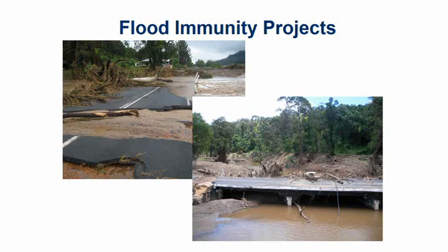And also timing of flood as well. They don't always flood at the same time, so that's something that needs to be factored in as well, and also included in the analysis. For example, if they all flood 10 days a year, but at all different times, then maybe you can fix up one of them. But if they all flood at the same time, then you really need to fix the whole lot up in order to have that whole stretch open. So there's a lot to factor in, and it can be quite data intensive. So a lot of assumptions were thrown in there in regards to the relationships between those projects.